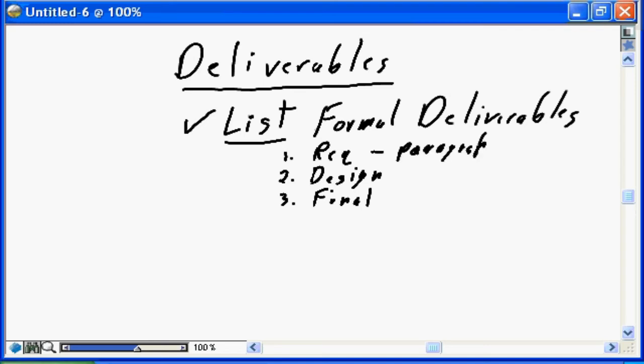defining the purpose. So if you say, I'm going to produce a requirements document and have a paragraph that says the requirements document will list all of the business requirements, or better still, the requirements document will list the 5 major business requirements that are going to be supported by this application. Again, you're better managing the expectations.